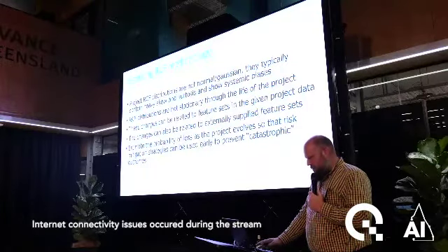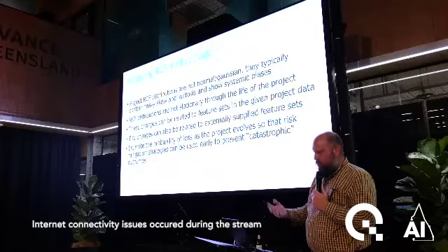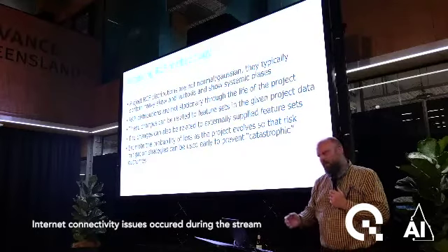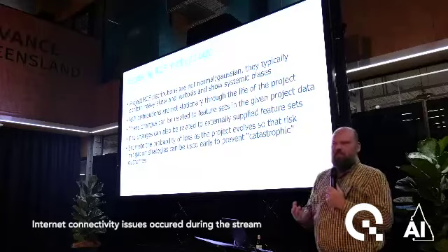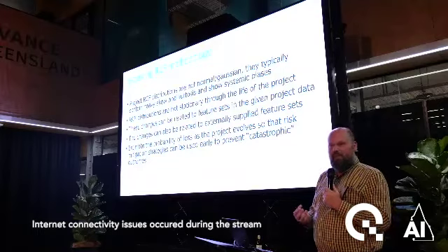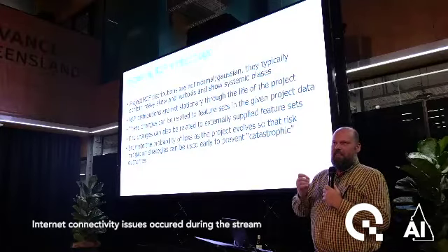Also, by having the distribution, and a correctly calibrated one, or better than what they're doing at the moment, it allows us to calculate the probability of loss if we're looking at margin distributions, and you can start finding projects that are going to go off the deep end.